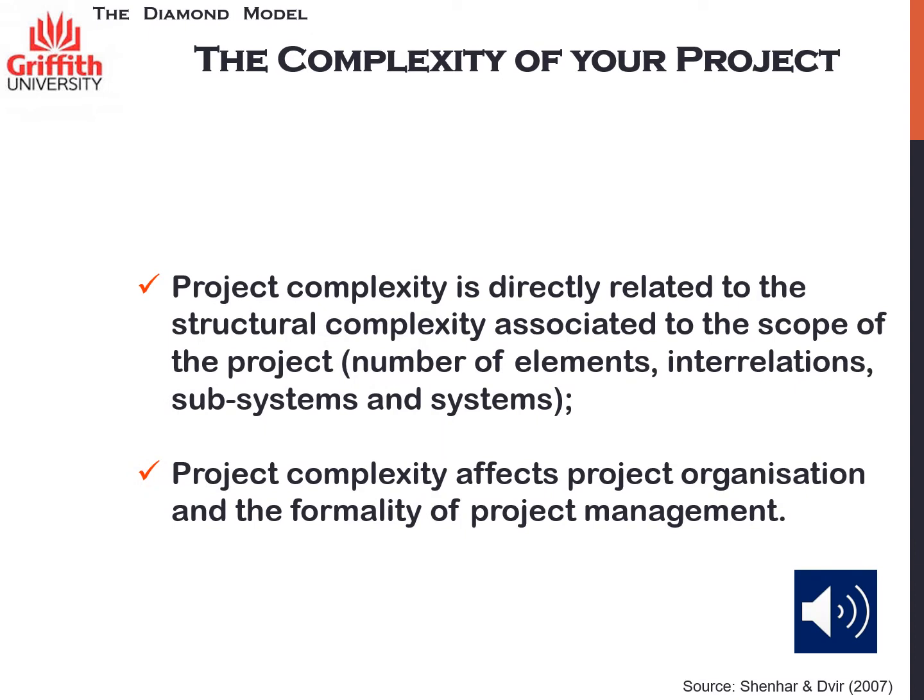Project complexity is related to the structural complexity associated with the scope of the project. That is, project complexity is related to the number of elements that the project has, the number of interrelations, the number of subsystems and systems that the project has. The higher the number, the more complex. We are talking here about structural complexity. Project complexity in these terms is important because it affects the organization of the project and the formality of project management.